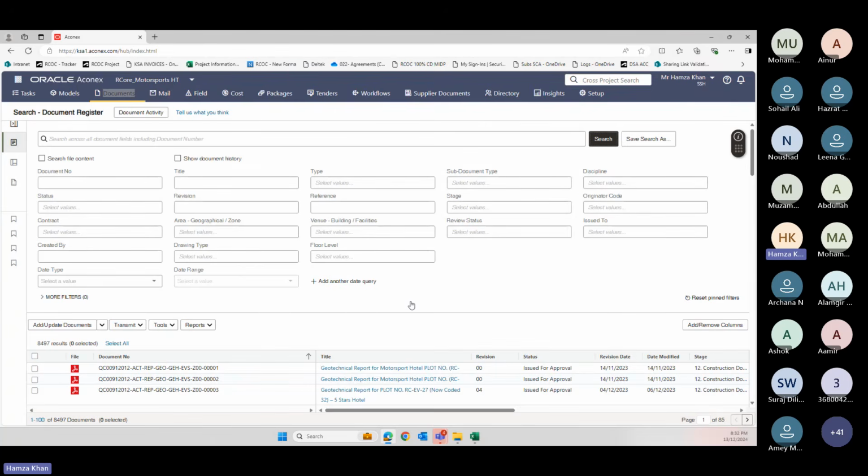So in an easy way, supersede means if your one document is revision 1 and you are resubmitting it again with revision 2, the revision 2 will supersede revision 1. Okay, it will come on top of it, like stacking of documents, revision by revision.